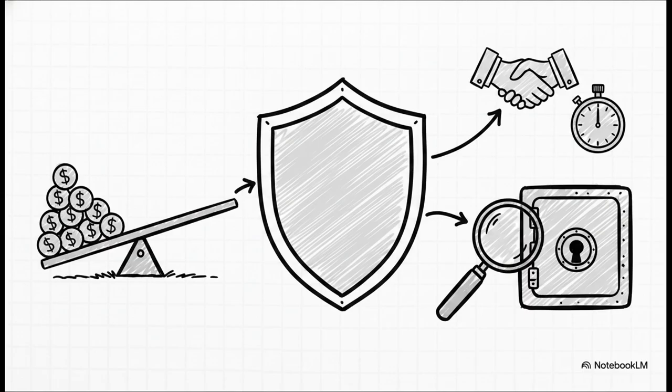Second, negotiate shorter payment terms right at the tender stage. Getting your certification and payment terms dropped from 30 days down to 14 days can literally save you tens of thousands of pounds in financing costs on a big job. Third, diligently monitor and track your retention so it doesn't just get forgotten the second practical completion hits.